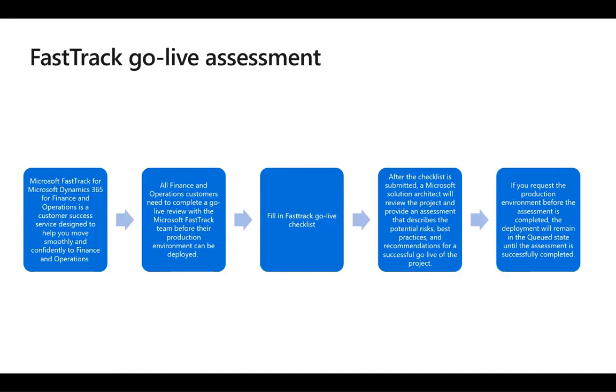We also have access to Microsoft engineering resources who are committed to making our experience with Dynamics 365 for Finance and Operations a success. All Finance and Operations customers need to complete a go-live review with the Microsoft FastTrack team before their production environment can be deployed. This assessment should be successfully completed before we request our production environment.